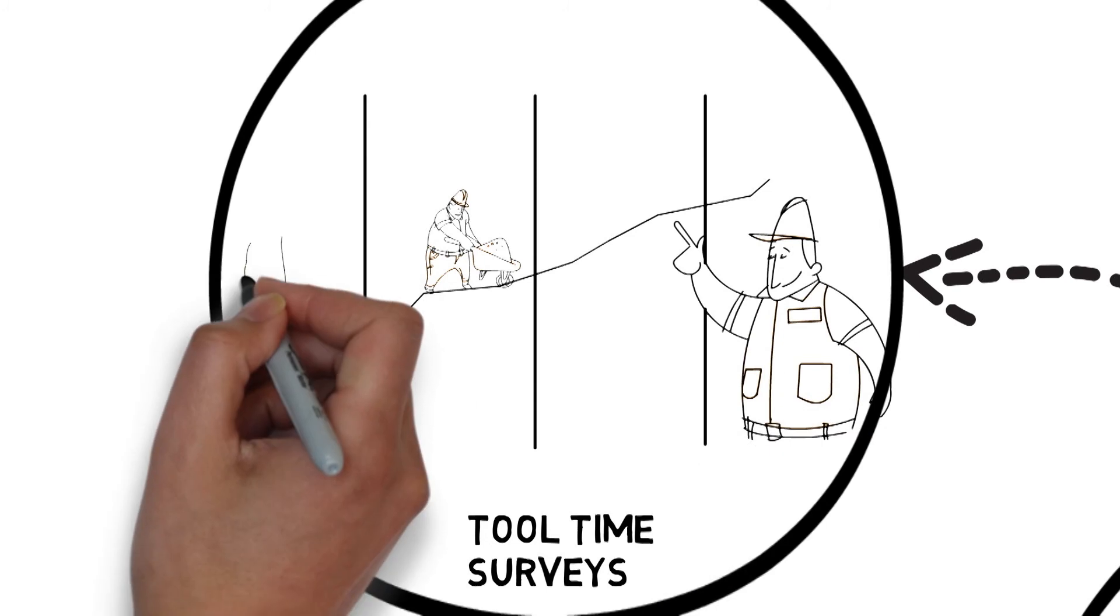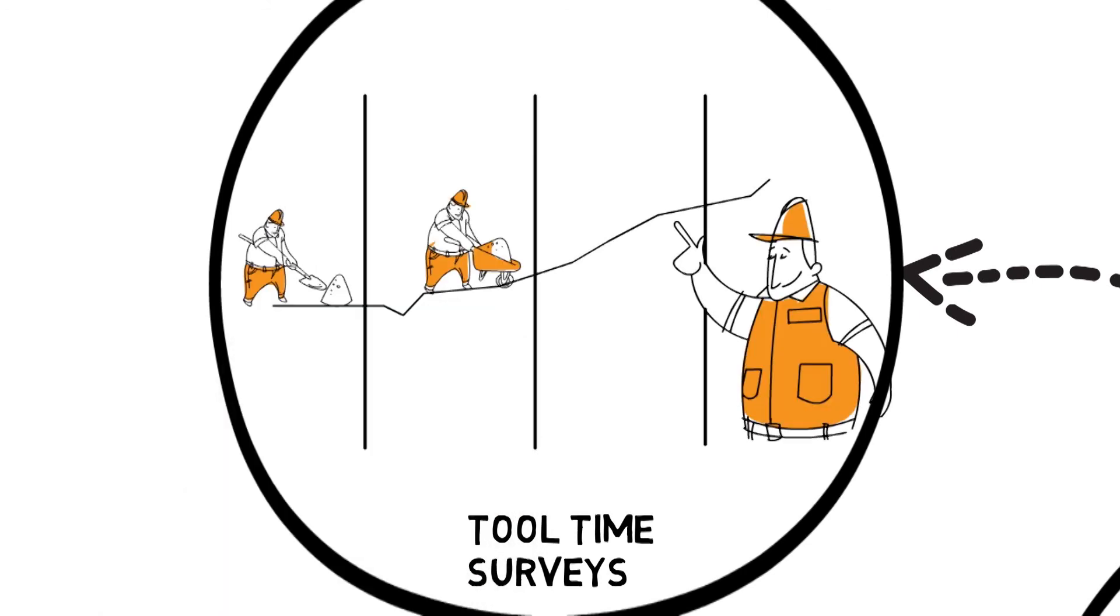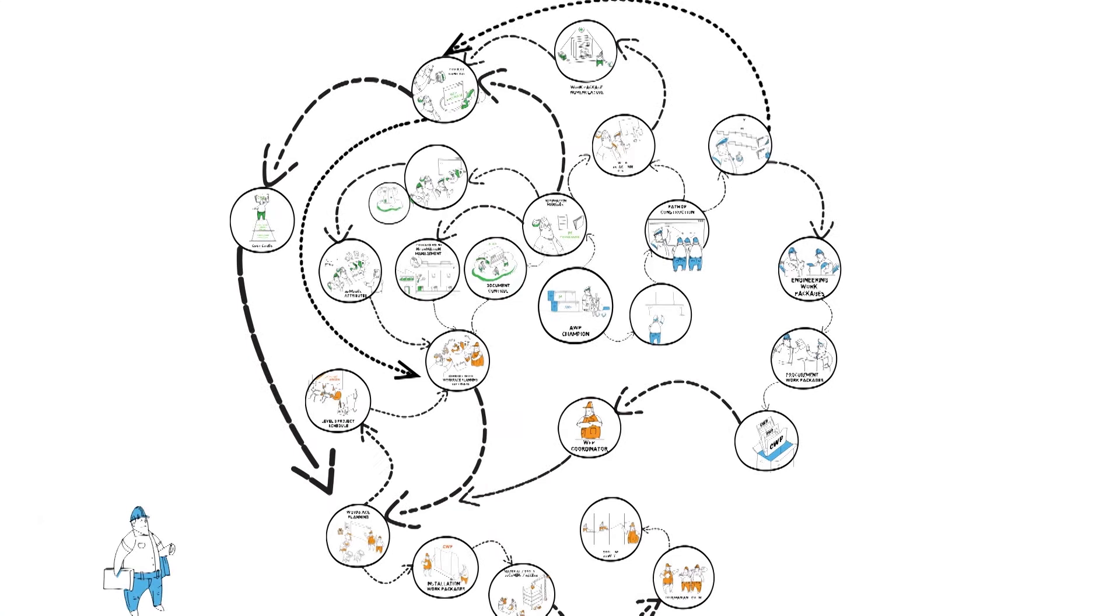The tool time studies also record specific events and field level processes that highlight productivity issues outside work face planning. The management of these opportunities leads to continuous incremental improvements.